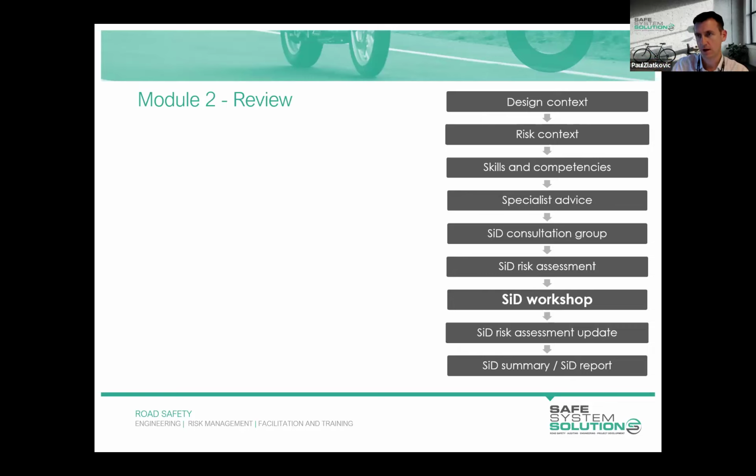So it's what you've, I guess, identified in theory through those small group exercises. Undertake that initial risk assessment, and then bring that whole group together to review the risks that you've identified initially, and also add new risks. Important to do that before 50% design progression in your concept and your detailed design, and then review that again at 90% design completion before you're wrapping everything up. So to review, I guess, progress made in addressing those safety and design risks.